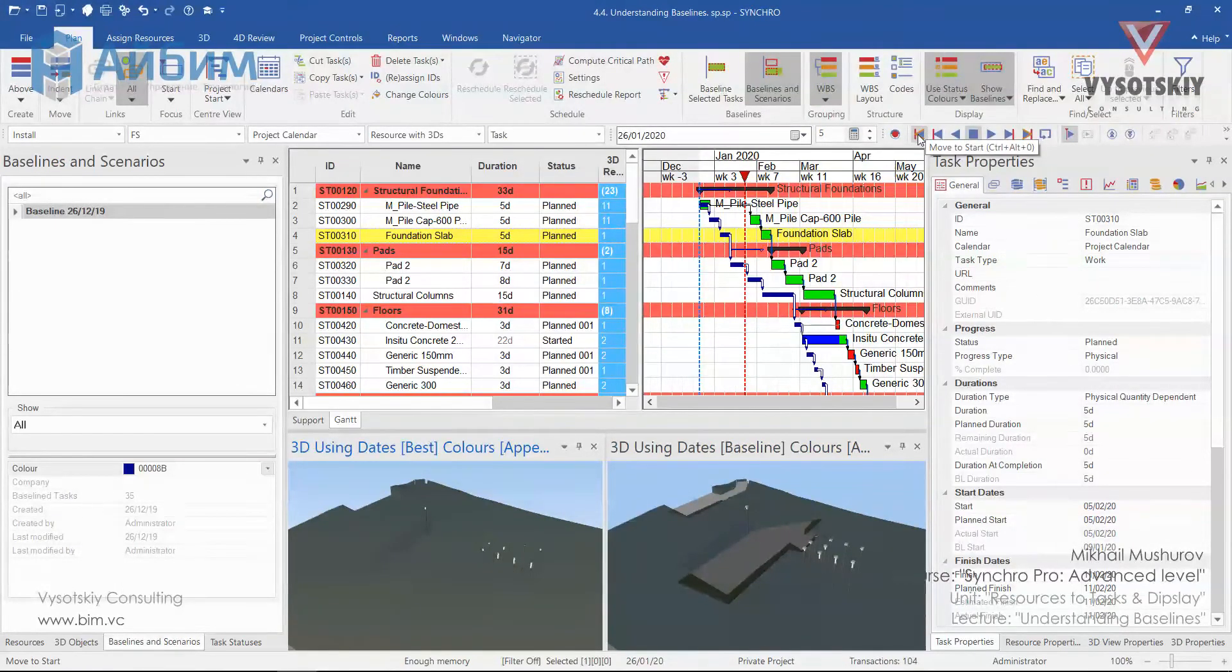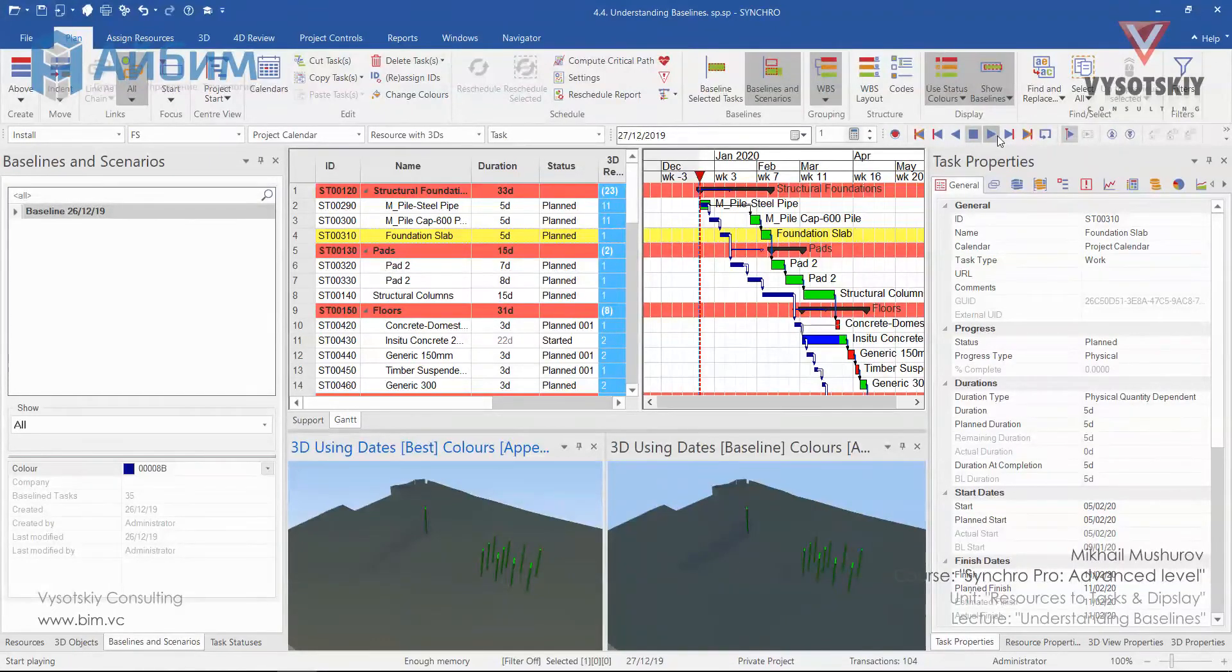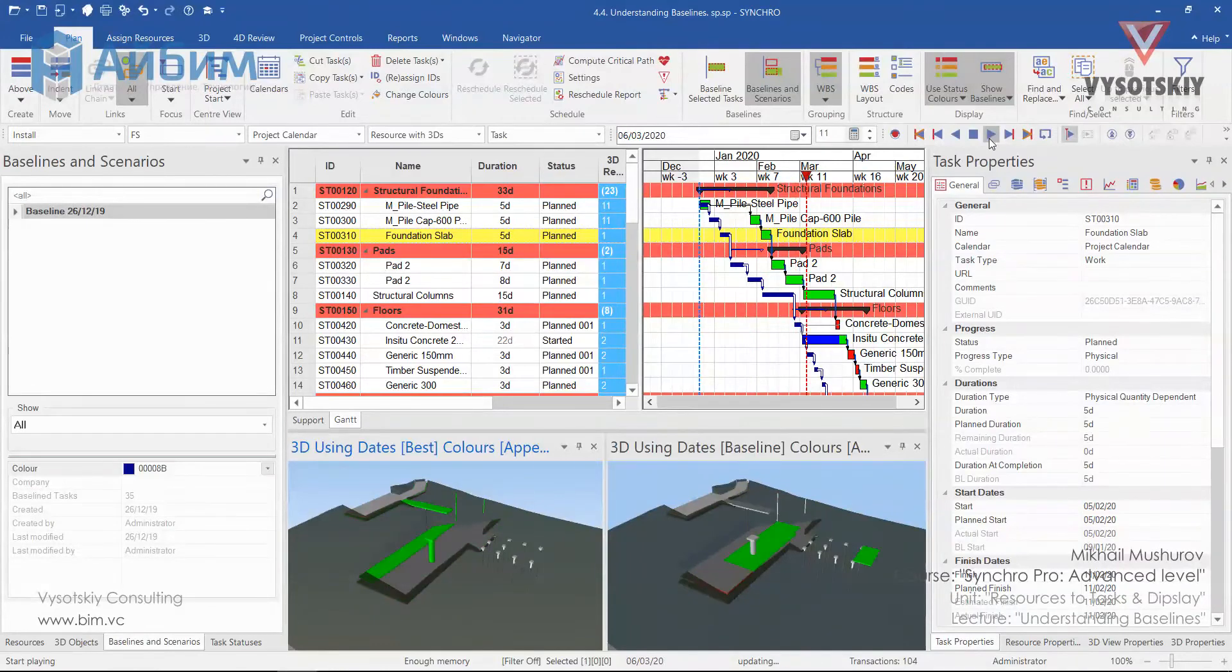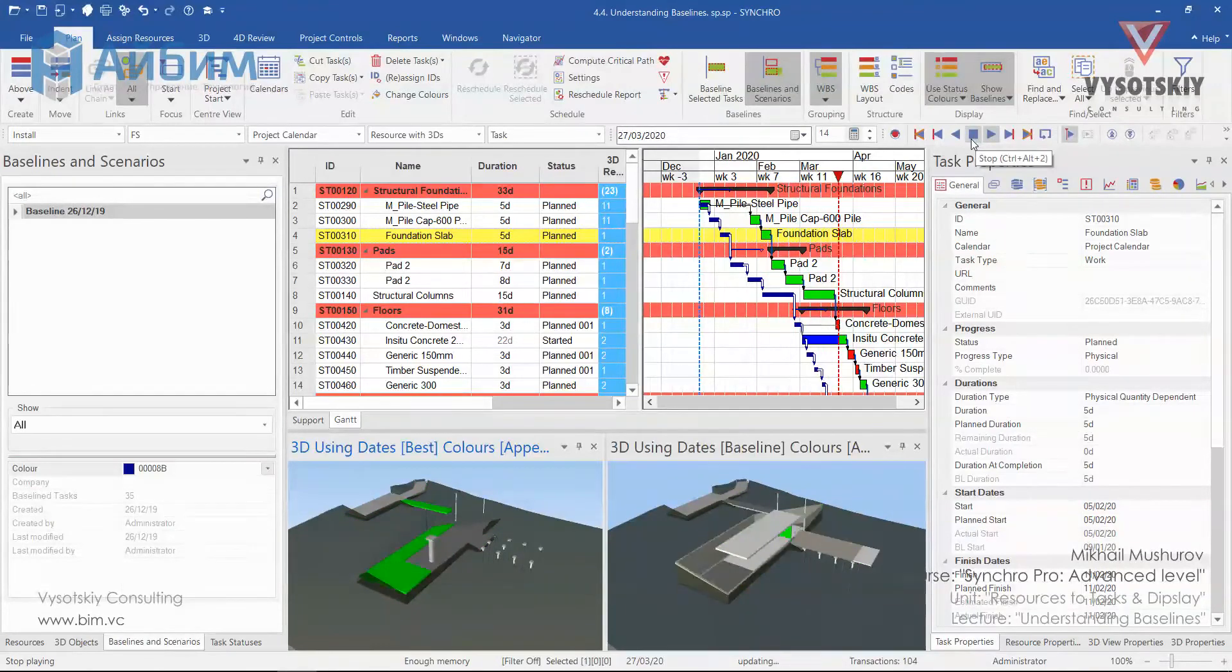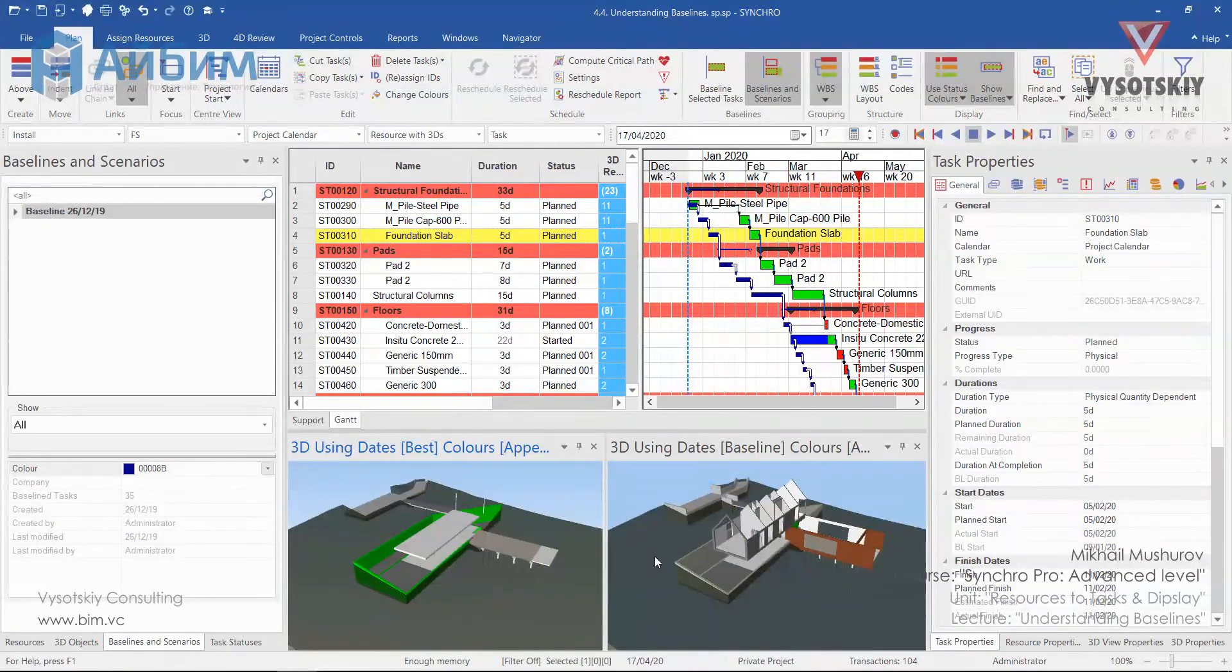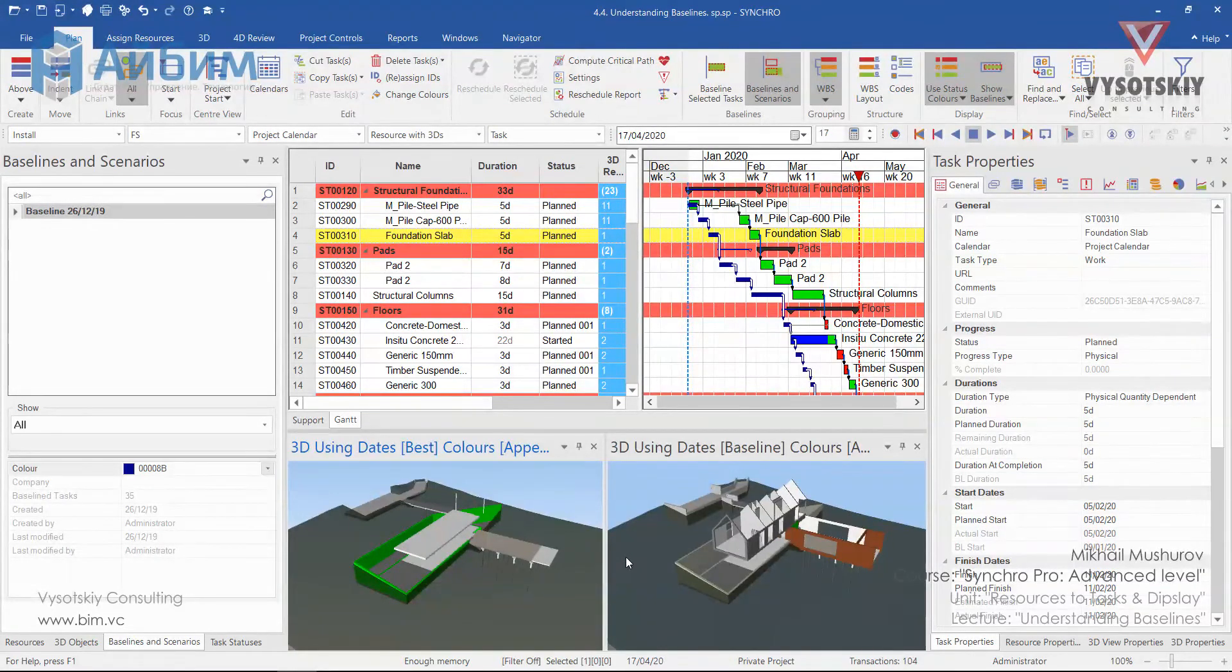Let's go to the start of the project and play the animation. Now we can see the difference in construction sequence in case of piles will be built later than it was planned.